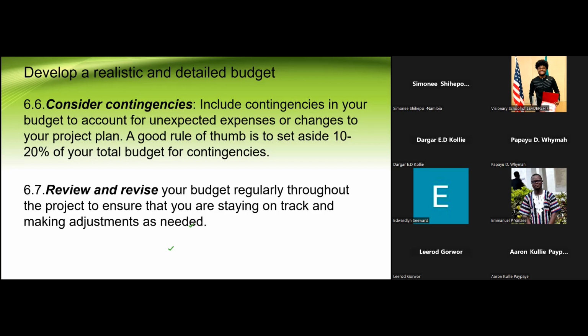The very simple way you can keep track is you look at your targets for this month. Our reach is 1,000 people in malaria vector control. So we reach 1,000 people this month. At the end of the month, you must evaluate how much you spent on that 1,000. If it's a regular activity, you already know by the third time you do that activity how much you spend on that. If there are discrepancies, it's easier to follow up.